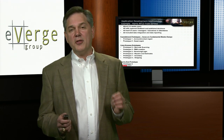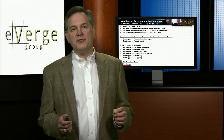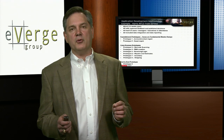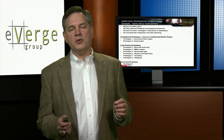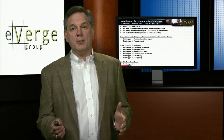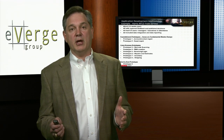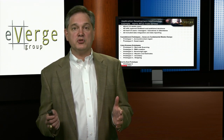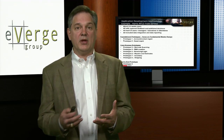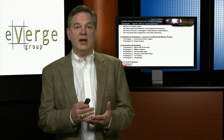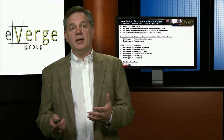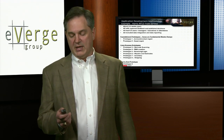You'll also find some tough nuts to crack — something like RMA creation may have two or three design challenges that are really difficult to fulfill with our application software. What you may need to do is have special sessions where eVerge's group recommends focusing on one aspect and inviting the same people to address those particular issues. As eVerge's consultants, we give them design options — here are your three options, here are the cost/benefit and advantages/disadvantages of each. If we were in your shoes, this is what we would do. Here's what our other clients have done — and let them make the decision.